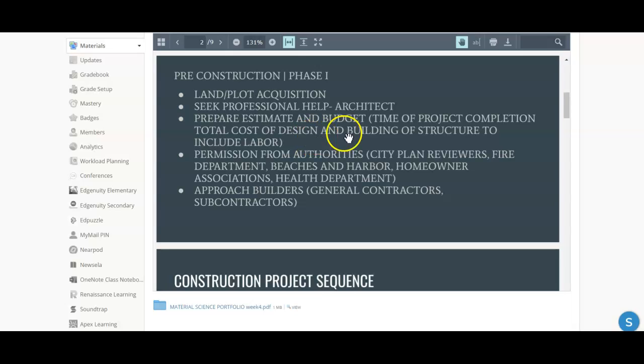Okay, and then once that all gets approved by the client, then the architect will also collect all the drawings from the engineers needed to submit to the city, and not just the city. Sometimes you have to submit to the fire department. Sometimes the fire marshal needs to see the plans and approve it to make sure everybody can get out safely, and where there's ingress and egress. Ingress meaning a way in, and egress meaning a way out. And so the fire marshal has to check that out.